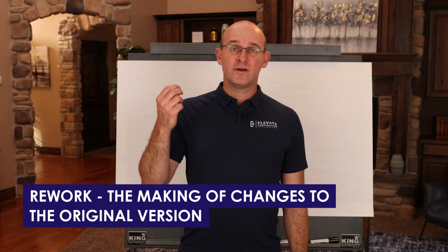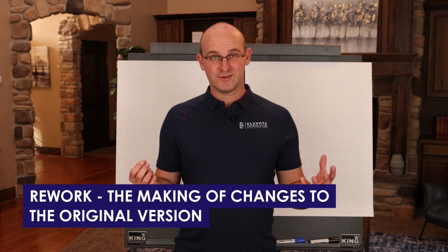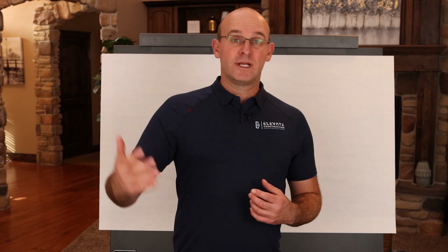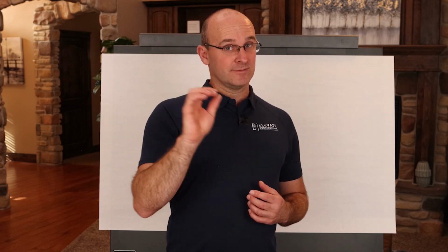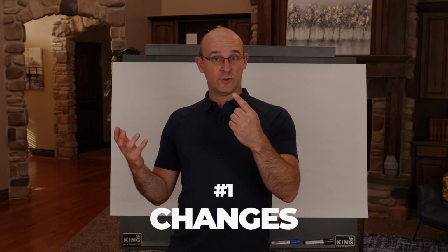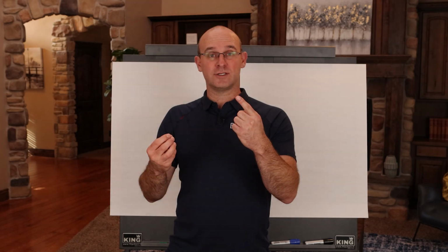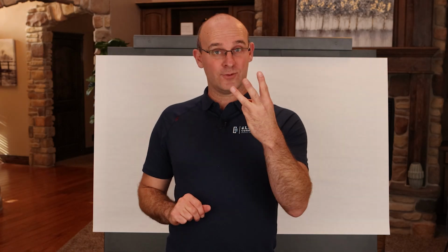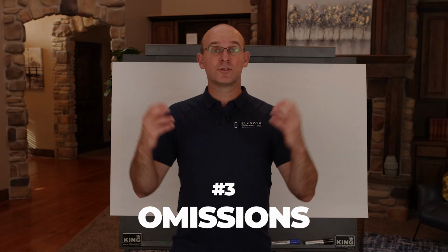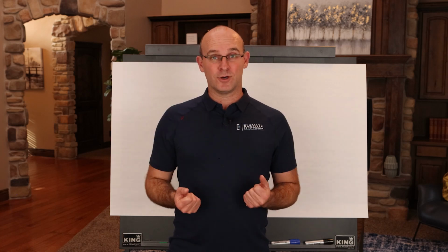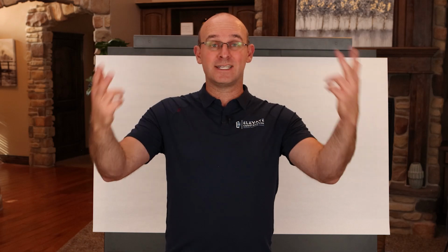What do we mean by this word? Well, rework is the making of changes to the original version. Meaning that we either have rework because it's being changed or because we did not install it right originally. The typical causes at a high level are threefold. Number one, changes to the work itself, meaning from the original direction. Number two, errors, meaning that something was done wrong in the original version. And three, omissions, which means that something was omitted or left out of the installation, which means that now it needs to be reworked. So those are the three main causes, and it's nice to keep those in mind.